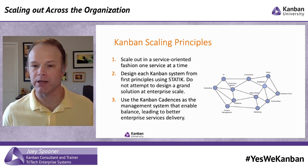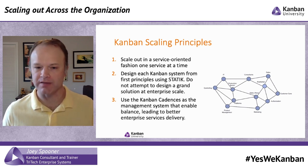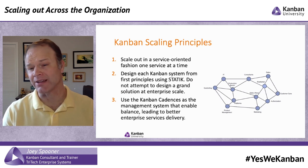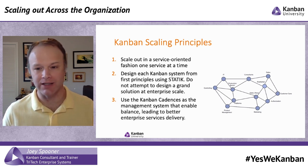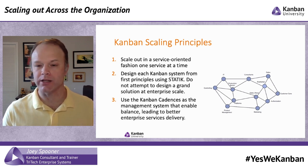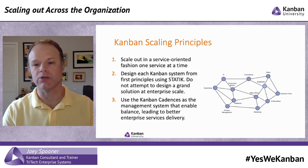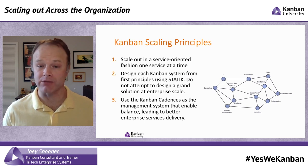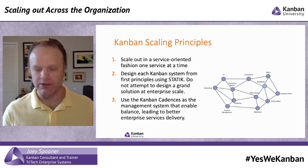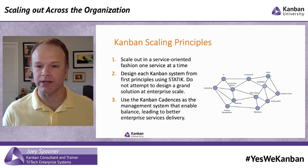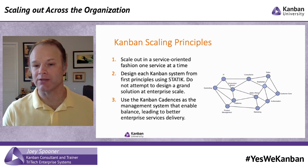Also, what kind of demand is coming at us that maybe causes us to recalibrate some of these services or ask them to change how they operate? You can see some services might be red — imagine one of these dots is actually a red dot. That indicates it's got a lot of risk, a lot of delay. We have a meeting called the risk review meeting. That's to say across the board, and also within individual systems or services, is something on fire? Do we need to address a problem locally within a given service, or is there something across multiple services? We're trying to develop a good, sustainable, survivable, customer-oriented business that has all these services connected.